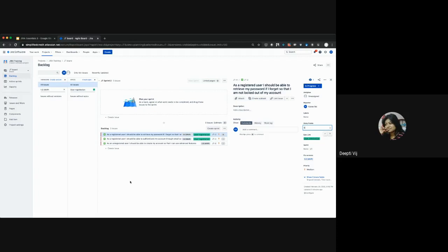Yeah, so that goes down to the basic principle of how a story should be written. A story should be written in a manner that it can actually deliver real business value. So if without sending an email, you're not able to complete a story, it shouldn't be a half-baked story, right? It shouldn't be something which does not really deliver any business value. It can be completed, but still people can't see an end-to-end demo and say, okay, this works. So that's the basic philosophy or thinking behind writing user stories.